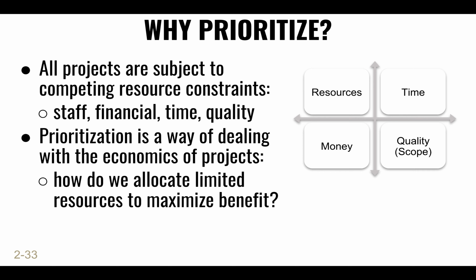And the things that become critical then are fed into the first sprints of what to build first, right? And also some implementation issues, such as what things depend on each other that might force you to implement certain things first and certain things later, right? You can't build one until the other one is built. So that also feeds into the equation there. But yes, you first have to have some prioritization to decide what you're going to start working on first, right? So identify those things that are most critical.